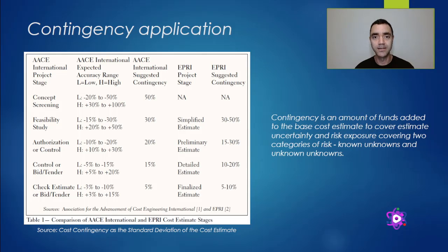If you are in a place where your equipment must be imported, for instance, you can have the risk of the importation taxes. They can increase or decrease, the dollar can be higher, can be lower. So because of that, you can consider different contingencies for different aspects or different kinds of capex or costs that you have in your project.